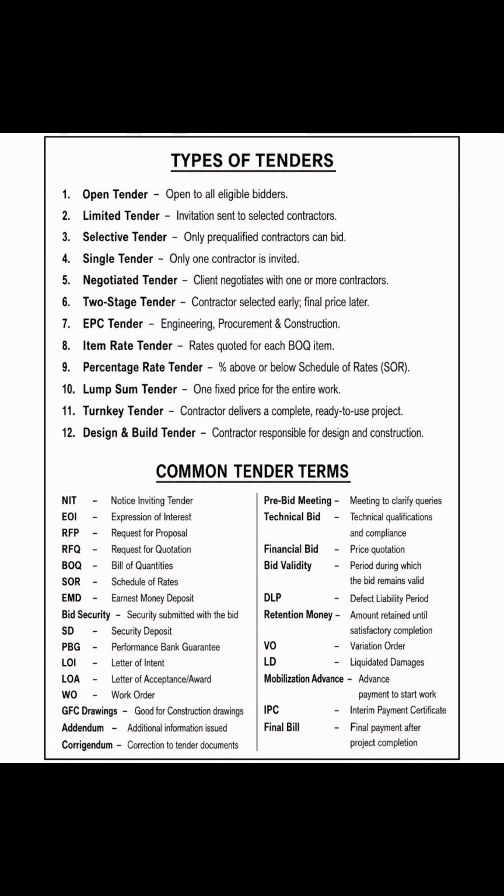Then in engineering, Ministry of Works, for instance, they call it engineer's order. You understand? Instead of the work order, for general procurement it is work order, but for engineering we call it engineer's order. The work order is what actually permits you to do the work that has been ascribed to you. But your engineer's order is what actually gives you the command on site as the engineer.